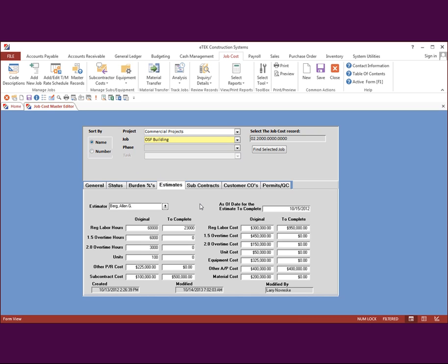The most important thing from a senior management point of view and a controller point of view is we also include the ability to come in at any point in time when you sit down and review the status of a project or job. You can say, okay, given the cost to date, what's it going to take to finish the job? So if you provide that input into the system, we take that into account when we calculate the revenue earned and the percent of complete, etc.